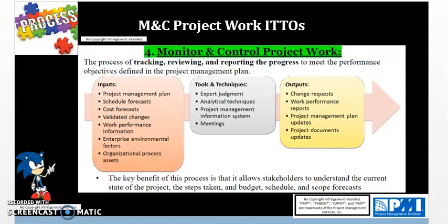And an output from all of this is going to be change requests. Well, we are monitoring and controlling, so it stands to reason that during the process of the project we will have change requests, like changes to the budget, changes to the schedule, risk or resource baselines. But as PMs, we are to raise a change request and give it to the change control board, which consists of the sponsor and other major stakeholders for review. These changes go to the perform integrated change control process, where they are either approved or rejected.